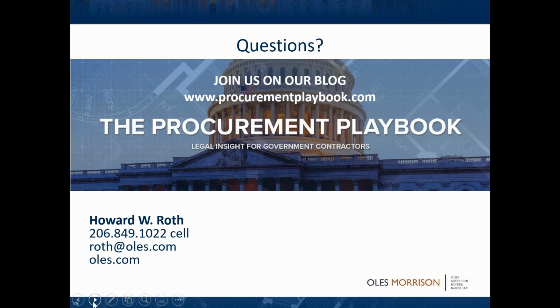You wouldn't get your attorney's fees paid for. You'd be in litigation with them. A lot of negatives. But I have helped people go straight to the claim situation. Even if you go straight to a Contract Disputes Act claim, you still have to give notice that there was a constructive change, a differing site condition, or a suspension of work. Otherwise you won't have complied with your own contract.